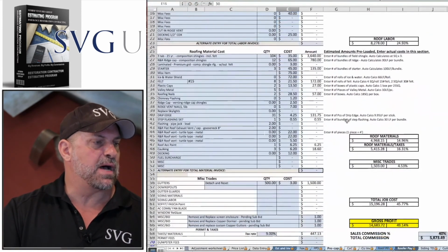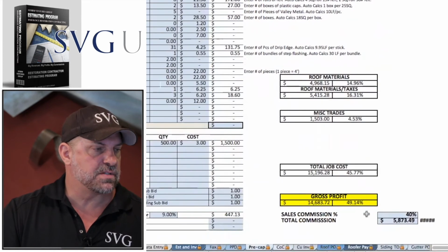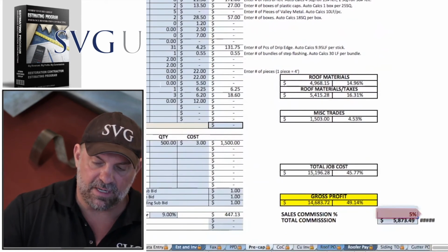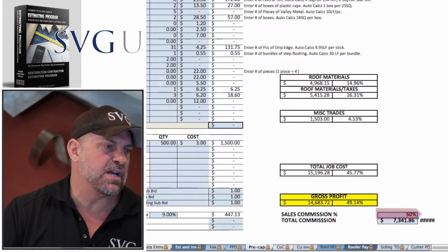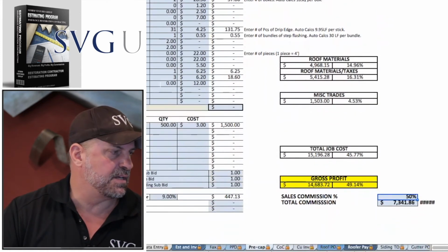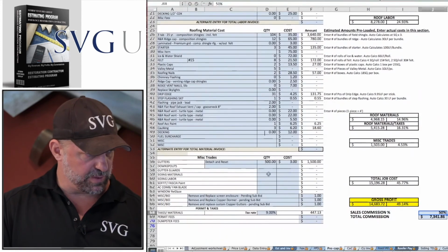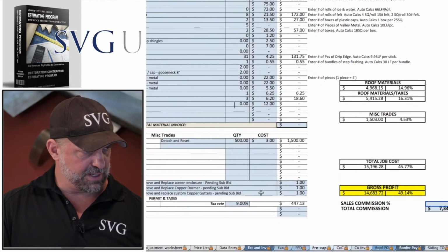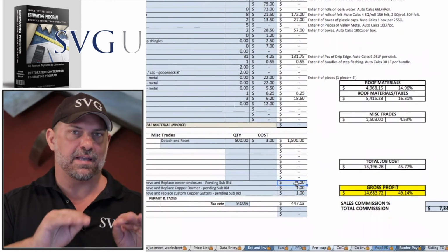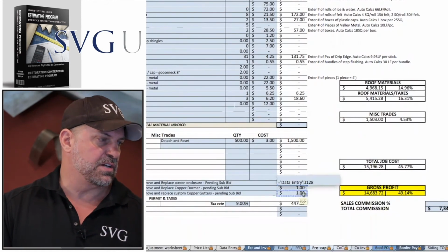And now you know, down to a box of nails, what your profit margin is. So this one's pre-capping at 49%. If your salesman's at 50, we used to staple these inside of the job file. Salespeople were motivated to look at their expected commission. Now in this miscellaneous trades area, while you're waiting to get those bids, once you get the actual bids from your subs, your production manager goes in here and writes the actual cost, which of course is going to change your pre-cap.